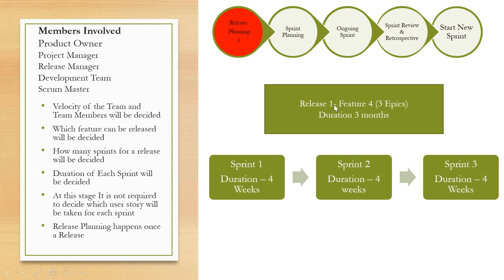For example, based on the velocity and capacity of the team, the team has decided to release feature four in release one. Feature four has three epics, release one would be after three months, and for release one they have decided to have three sprints with a duration of four weeks each. At this stage it is not required to decide which user story will be taken for each sprint — only how many sprints are required and which feature will be released first. Release planning happens once per release.